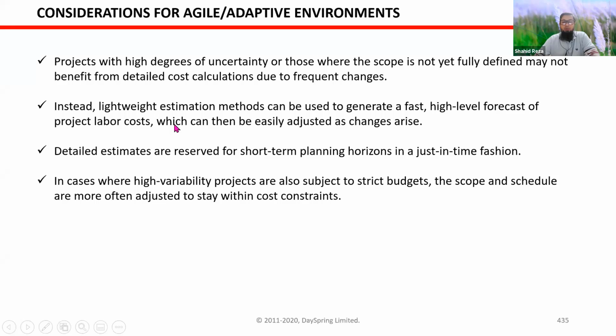And generally, when we make any contract with a vendor in an agile environment, we agree with them on a master service agreement that we'll study in the procurement chapter. Within that master service agreement, we try to fix time and cost, and we always keep our doors open so that we can make any change related to scope.